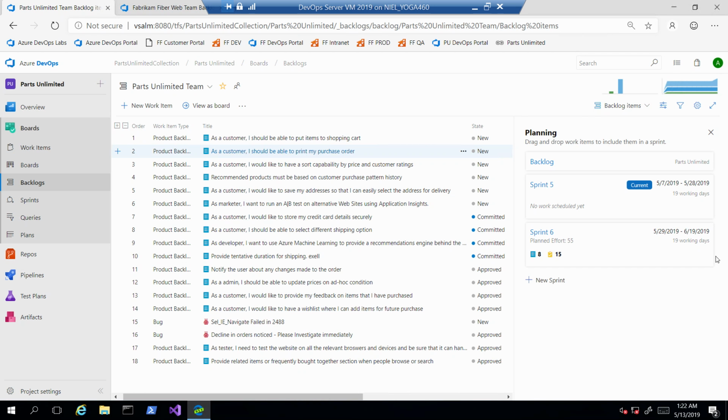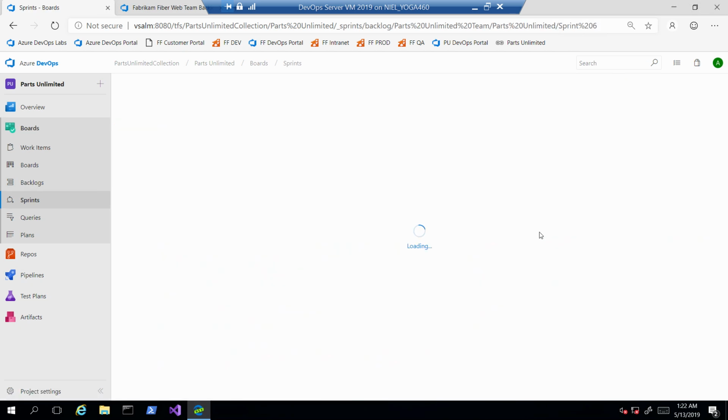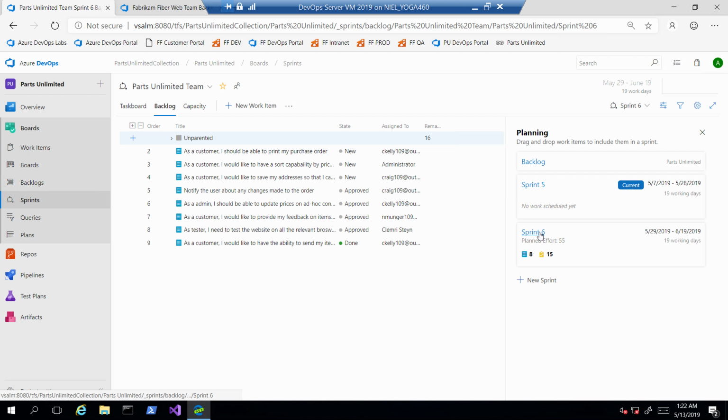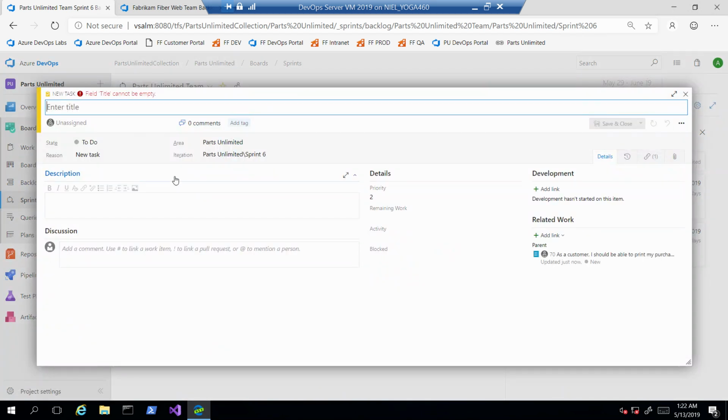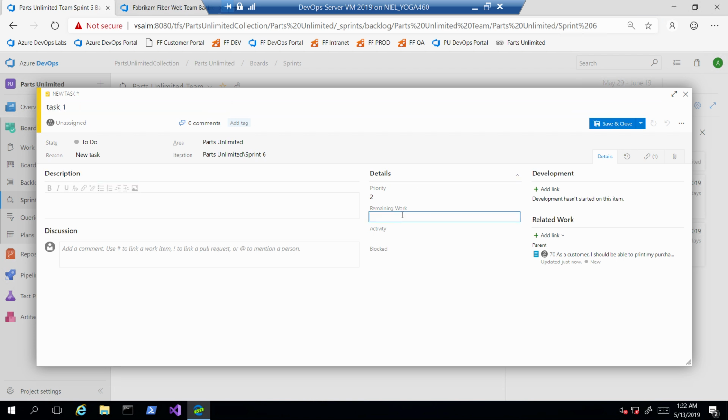Once we've done that, if we go and have a look at our sprint, this is now our sprint backlog. So these are the items that are on the backlog for this sprint. And this is what the developers would actually work on. So the developers look at this. They'll take these items, break them down into tasks, and in this case, you'll see that this is PBI.